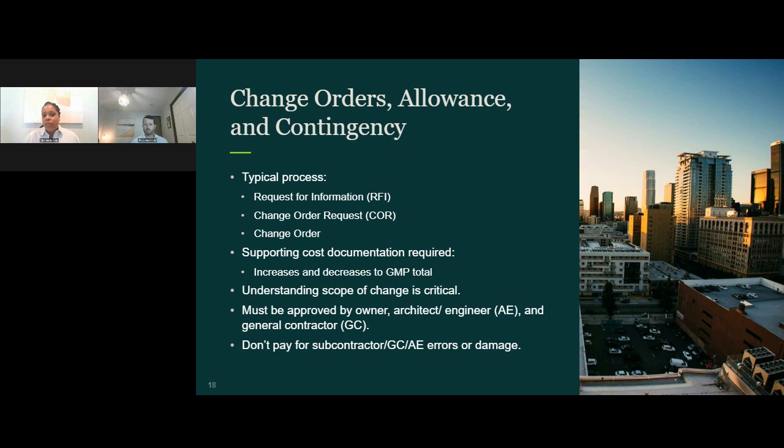I know when I work with healthcare organizations specifically, a lot of the changes are sometimes end user or stakeholder based. So building a new hospital or a new surgery center, and physicians think that you should have this here, but it was spec'd out to be on the other side of the hospital, or something that won't work for you, maybe in an emergency or acute situation. And so making sure that there's also a specified internal process for you as an organization of involvement of key stakeholders early and often, and then what that process looks like for when changes are proposed or are needed based on basically practical use and application.